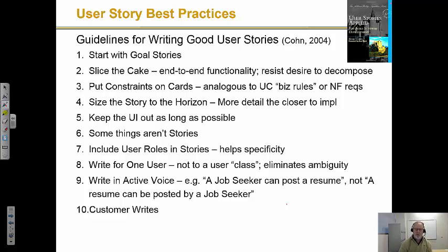If you have to sit there and have a long, repeated conversation, somebody's tempted to do some detailed analysis about something to understand the story, it may be too long, too complex, or maybe that conversation is not that important to happen in the first place. The customer could tell you, this isn't that important right now anyway. All right, well, keep the card, mark it as such, and put it in the back of the backlog and worry about it if it ever makes it toward the front of the queue.